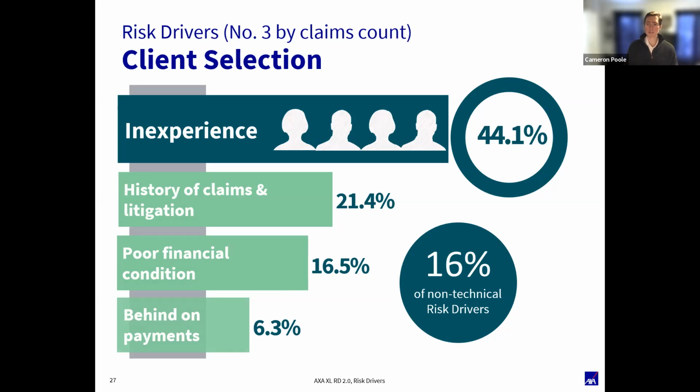Those inexperienced clients are a significant driver of claims because their expectations are out of whack. The other thing is it's personal to them, right? This is their home. They often have their life savings in that home. So if there are issues, it hits them personally and they're more likely to file a claim. If you work on a commercial project for a big company, oftentimes they're just going to say, we're going to write the check because we need to get into this space by X time, and it's not worth it for us to file a claim, and we have the money. For individuals, that's not usually the case because it is far more personal.